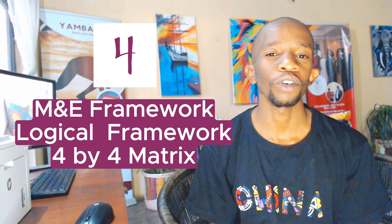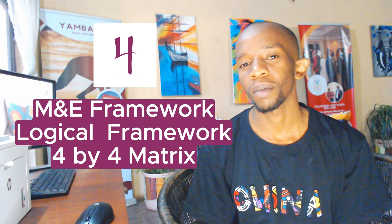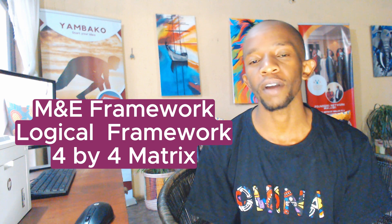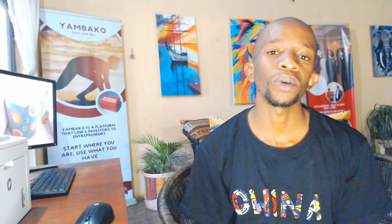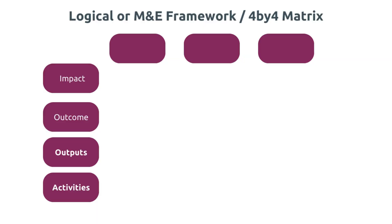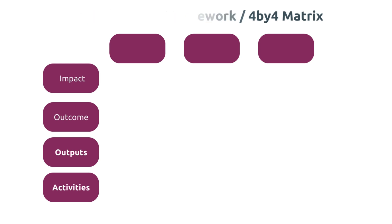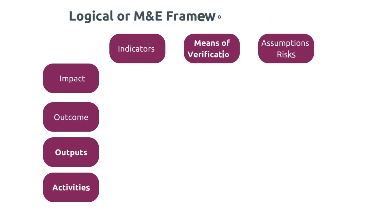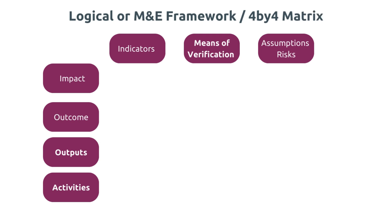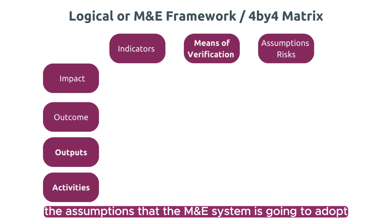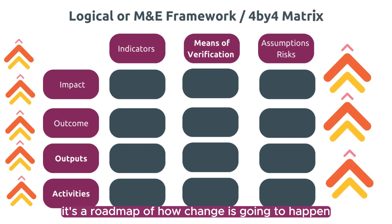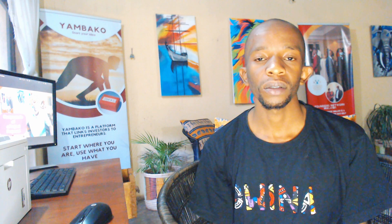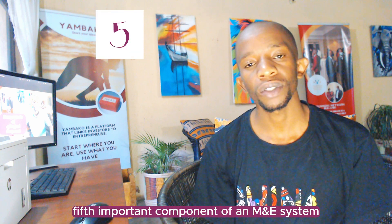The fourth important component is an M&E framework or a logical framework — sometimes referred to as a 4x4 matrix. An M&E framework outlines the project's inputs, activities, outputs, outcomes, and impact, along with the indicators that will be used to measure all of those. It also outlines the assumptions the M&E system is going to adopt. Essentially, it is a road map of how change is going to happen.